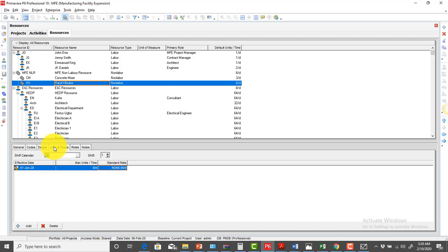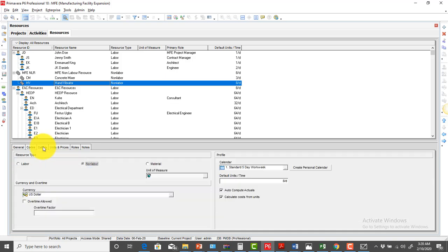And for that, we're going to be needing a maximum unit of about, let's say, 3. We're paying 50 per hand vibrator, and then under the default unit, I select 3 per day. Okay, good. So I've created hand vibrator, and then of course let's create another non-labor resource.